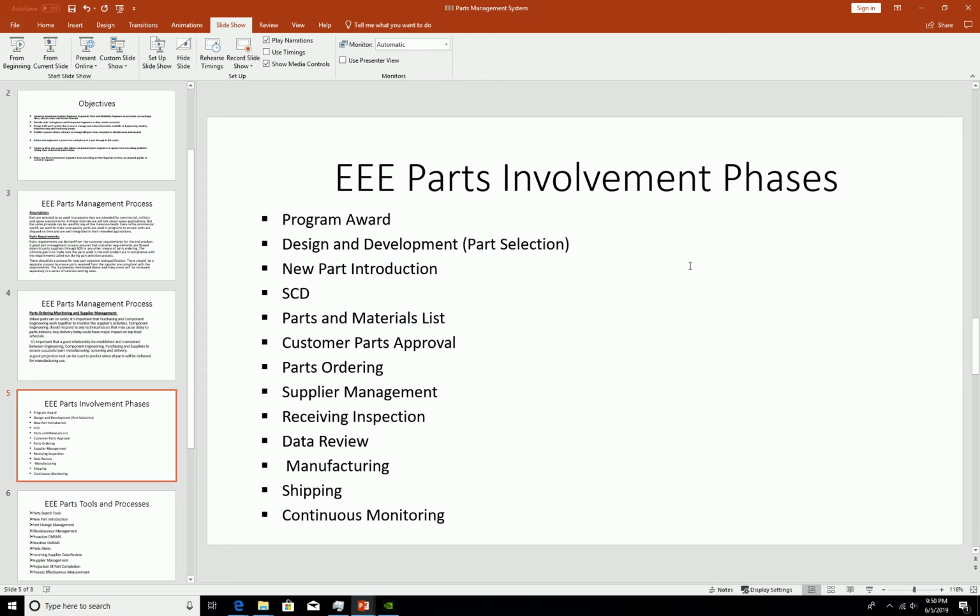After you get approval on the part list, you start ordering. But sometimes the program is so dense that you cannot wait for customer approval, and you have to take the risk of ordering parts before approval of your part list and material list.